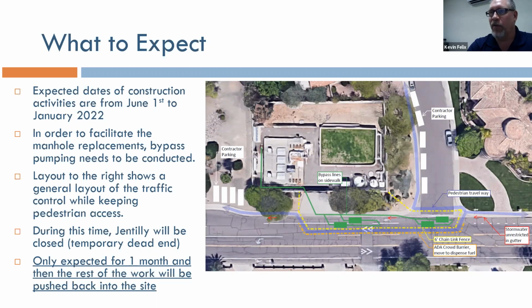And the reason for that is we have to dig a hole about 20 feet deep in the southeast corner of this plant here. In order to facilitate that, we have to demo out the existing biofilter, which is this green structure that's in the middle right there. And what that is, it's like a swimming pool without a bottom on it. And this is the existing biofilter.